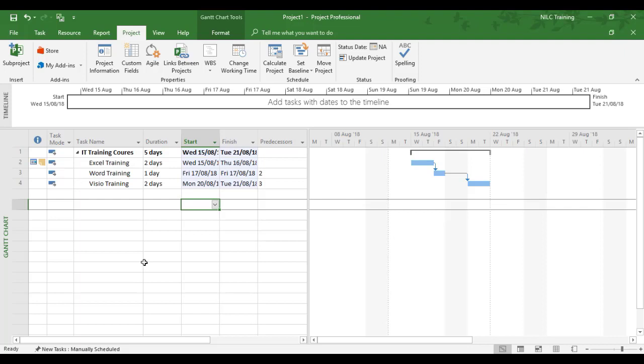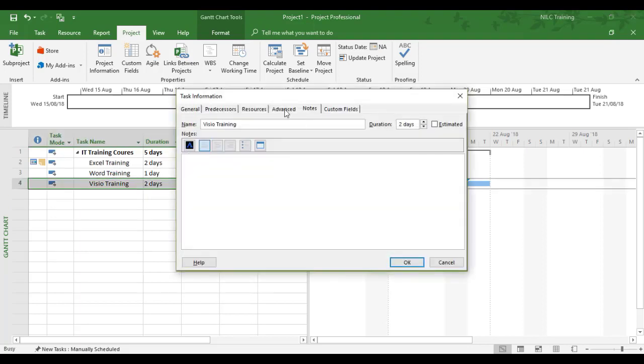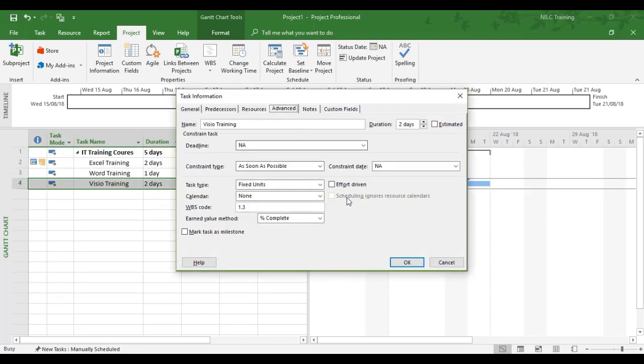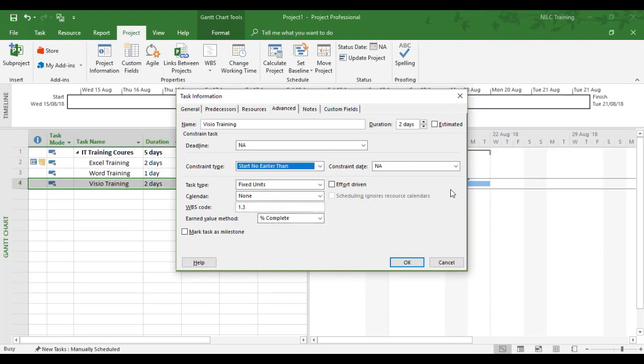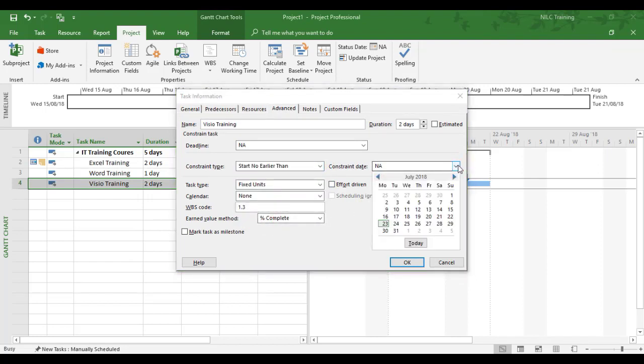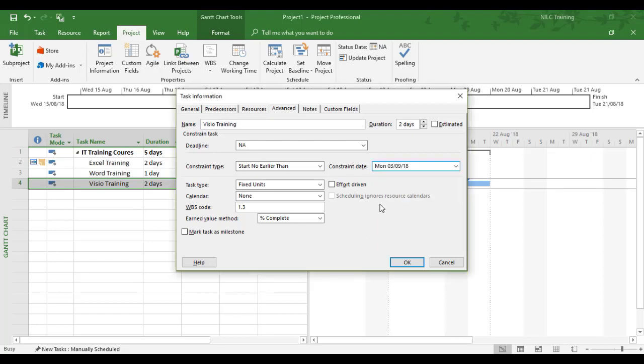We might have a similar problem with the Visio training—it couldn't be undertaken for 10 working days from Monday the 20th of August. I'm going to perform the same activity: double-click it, put a constraint on, and we don't want the 20th of August, we want another 10 days from there. We'll go from the 27th to the 3rd of September.